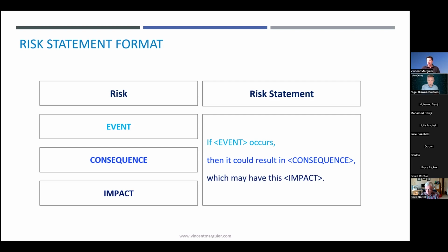It may happen that the consequence and impact are always the same reductive one. For example, well, then we can't launch the product. That's a classic. So the project manager's role in this case is to accompany the thought process of the team member to be as precise as possible, using, for instance, root cause analysis, 5 why technique, or coaching questions. Yes, we can't launch the product, but be a bit more precise. Why can't we launch the product if that event occurs?